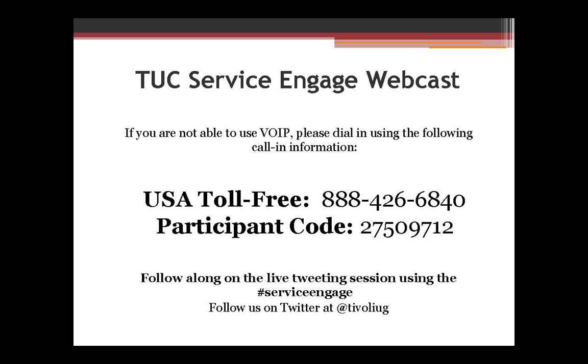Some other thing that we really like doing is we don't like having experts in one specific area. It's very important that all of our developers are full stack. The way that we organize our tasks is we always organize them by priority, and then the next person available takes the highest priority task, whether or not they're good at it. What that allows us to do is that anytime there's a problem in the site, anyone, no matter where they are, can help with everything. And that really has allowed us to develop quickly.